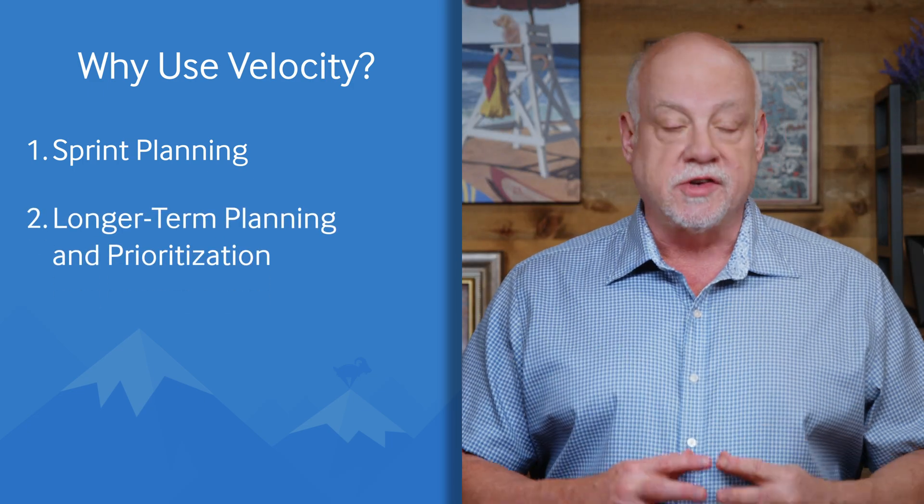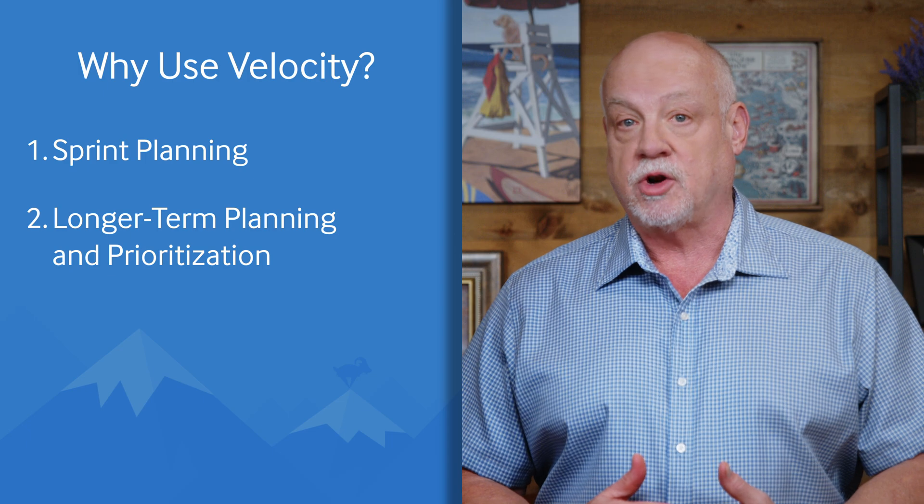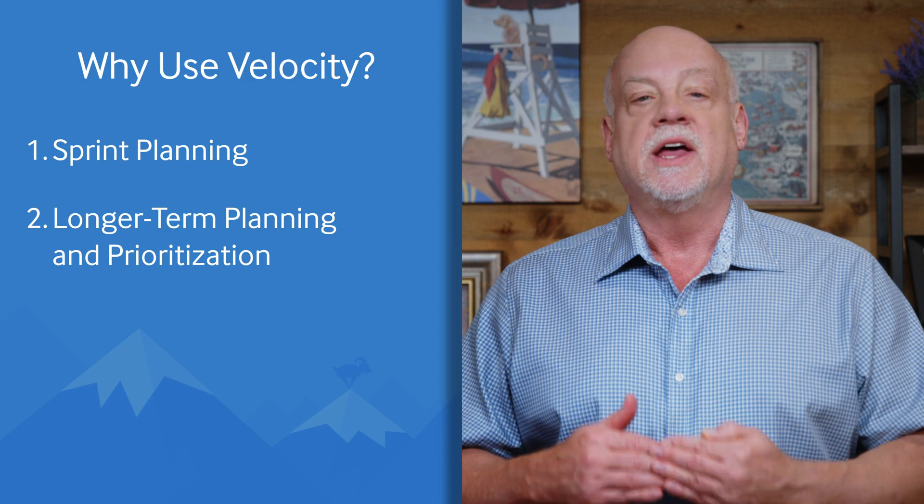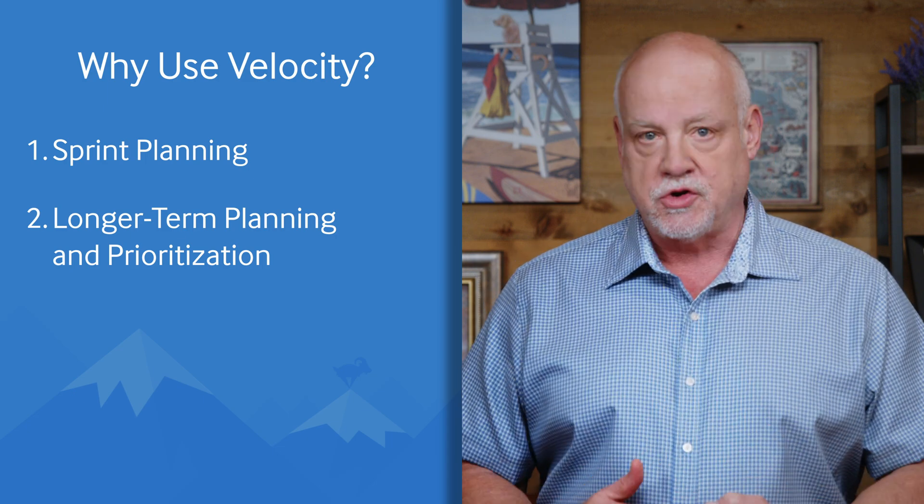Velocity can also be used for planning further ahead than the next sprint. Using its average velocity, a team can provide a rough estimate of how much it can deliver in any given number of future sprints. It's wise to use a velocity range rather than a single value. For example, if a team's average velocity is 20, it would be safer and more accurate to use a range such as 16 to 23. Using this velocity range, a team could forecast that in five sprints they will deliver between 80 and 105 units of work.